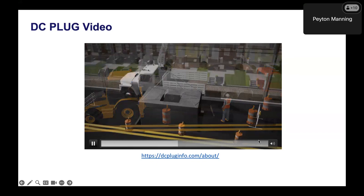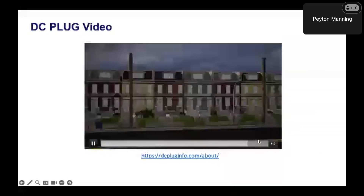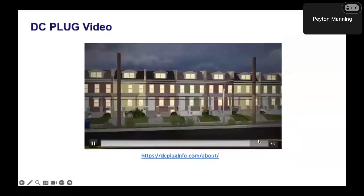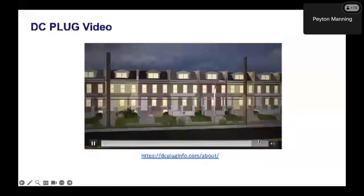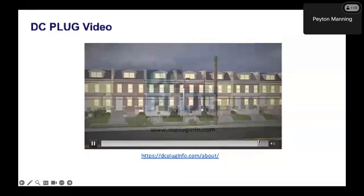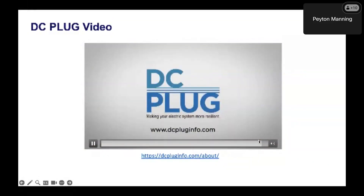Overhead primary electric wires will be removed from poles, but secondary service and communication lines will remain. Finally, the new underground power lines will be energized. While electricity will remain on throughout the project, there will be a short scheduled outage needed to switch from the overhead lines to the new underground system. We appreciate your patience while the District and PEPCO improve the future of electrical service for District of Columbia residents.